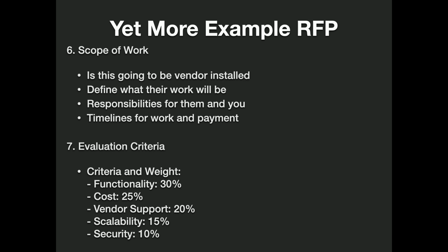Scope of work. Who's going to actually do the install? Are you going to do it? Will you do it with their help, or will they do it? You need to define your scope of work. This is also, again, very important, more so in larger corporations. But what is expected, and what are the milestones? And then there's the evaluation criteria, which I think Alex will go into a little bit more. How do you evaluate it? That's usually based on your requirements and how much weight you give them. So if you want to be able to remotely wipe machines, you weigh that more heavily than can you brand, let's say, a self-service portal.